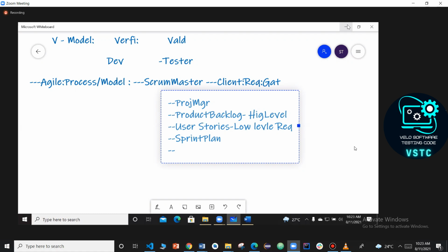So for now, we are having 50 user stories. In these 50 user stories, first we have to work on 30 user stories. In those 30 user stories, first we have to start working with the first 5 user stories. So once those 5 user stories are completed, when it has to be released, when all these 50 user stories have to be started, when they have to be completed, how they have to be released, that part needs to be done. That is what we mean by sprint release.